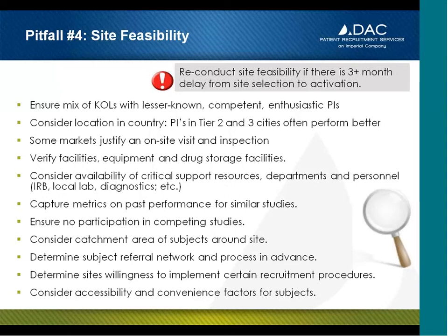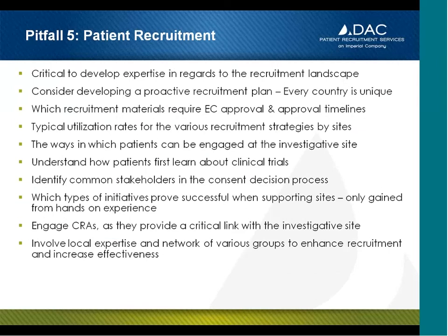So as we look at the next pitfall, pitfall number 5 is patient recruitment. The most successful sites on clinical studies have a written recruitment plan that is periodically discussed with the sponsor or CRO. And this plan is used as a discussion tool during all stages of the clinical trial, all the way from feasibility, selection, activation, and then even more so perhaps during those interim monitoring visits to determine how a site is performing and how the study team can best support the recruitment and retention efforts.